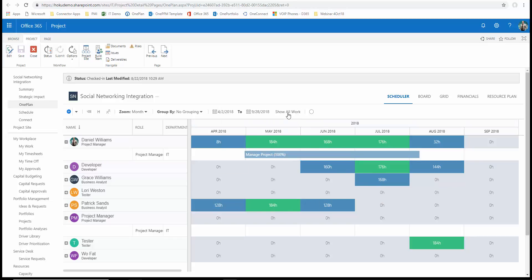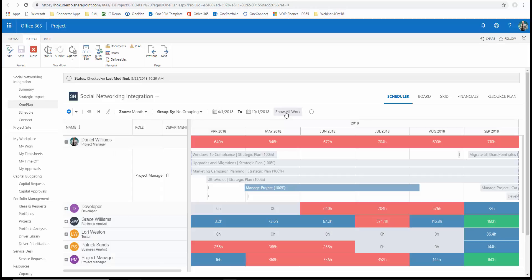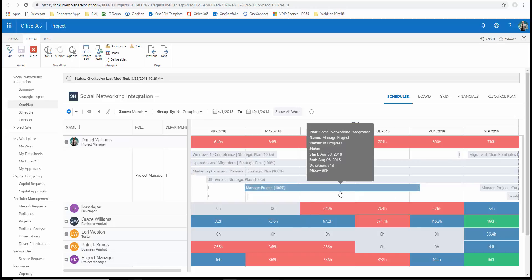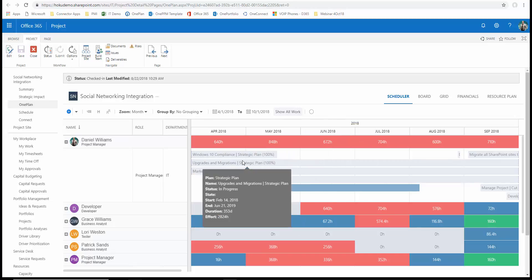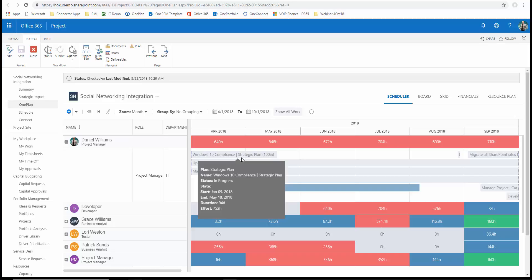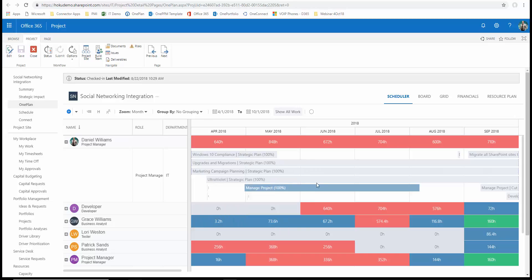But we can also show whether or not across all work across the entire enterprise, whether or not this would over allocate this resource and show all the different things that they're involved in. We have color coding to show things that are currently in work versus things that are currently upcoming for work or things that have been completed for work. So we can get a good visual on all of that as we see and all the scheduling that's done here syncs automatically with the resource engagements capability in Project Online.